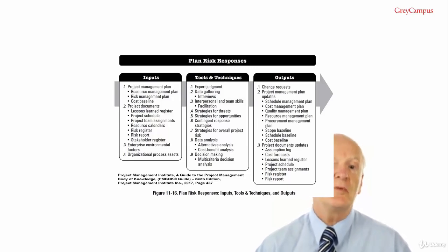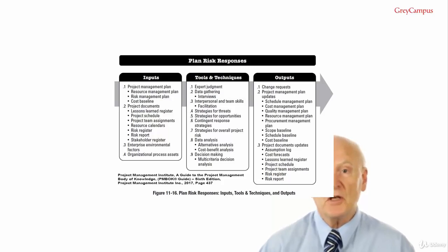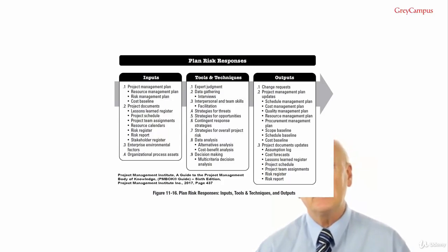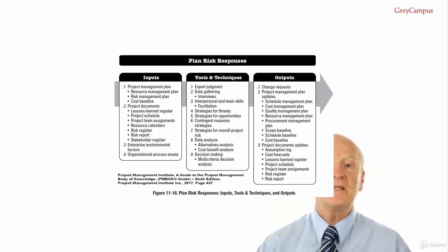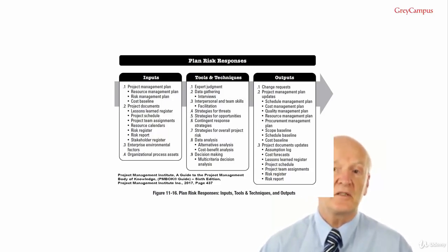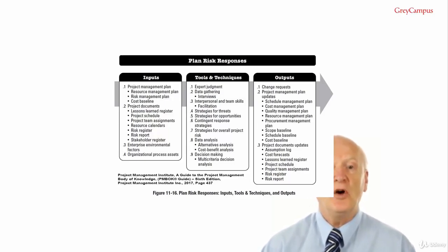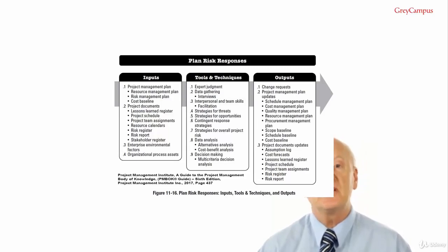It is important that ownership of the escalated opportunities is accepted by the relevant party in the organization. Opportunities are usually escalated to the level that matches the objectives that would be affected if the opportunity occurs. Escalated opportunities are not monitored further by the project team after escalation, although they may be recorded in the risk register for information.